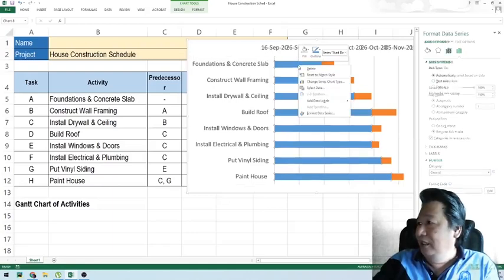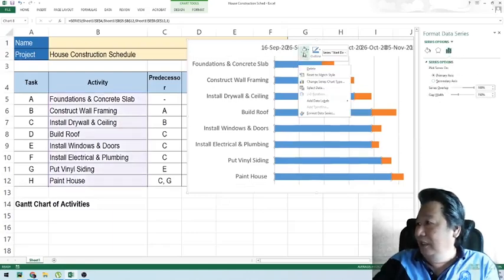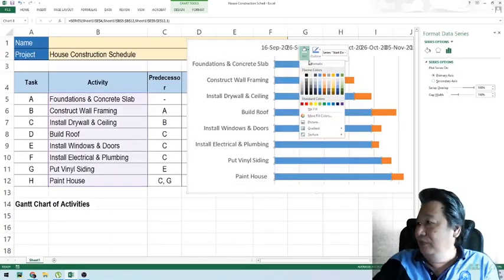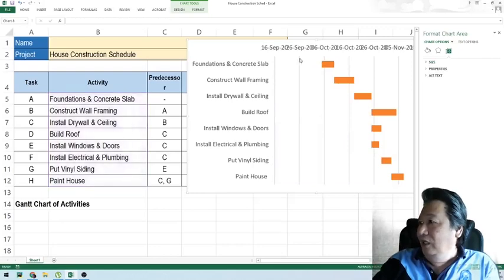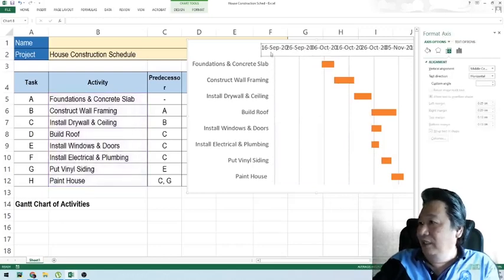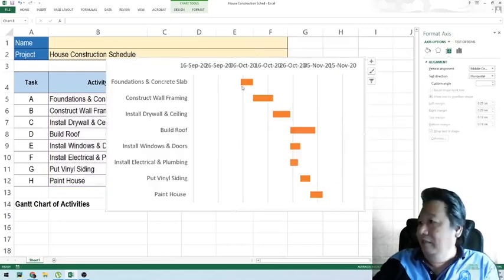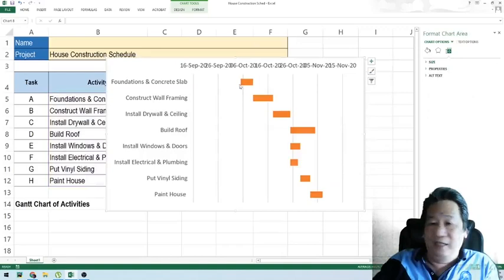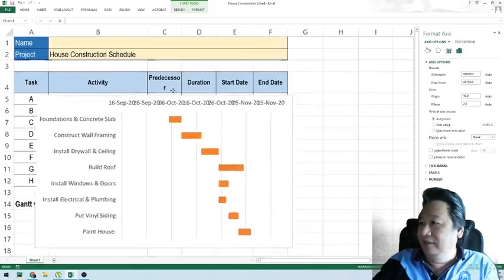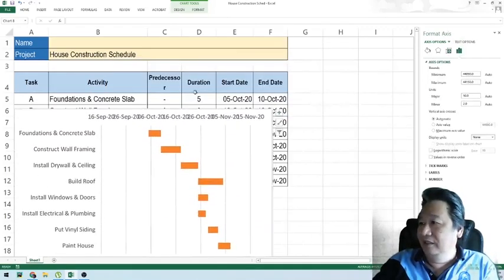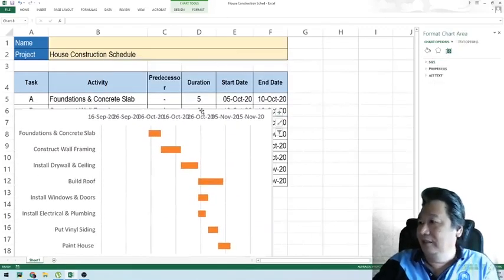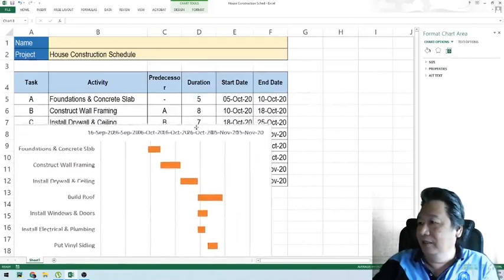Next, we are not going to fill the first bar series — so we select it and choose 'No Fill.' Then we clean up the chart by making the Gantt chart start at the actual starting date. Let's make it smaller to get a better view.